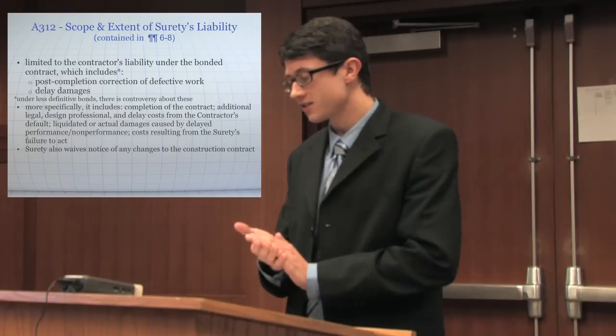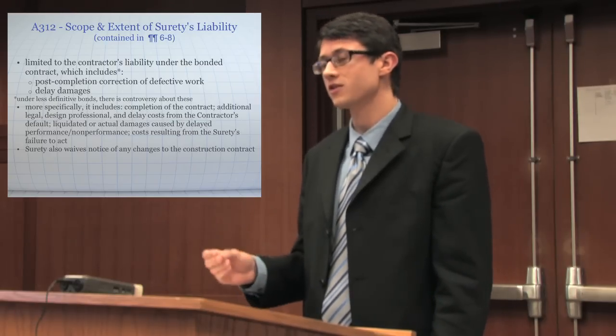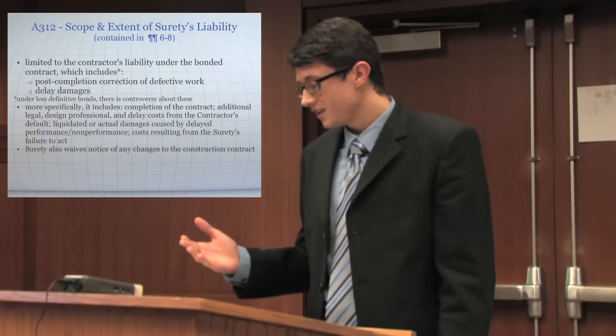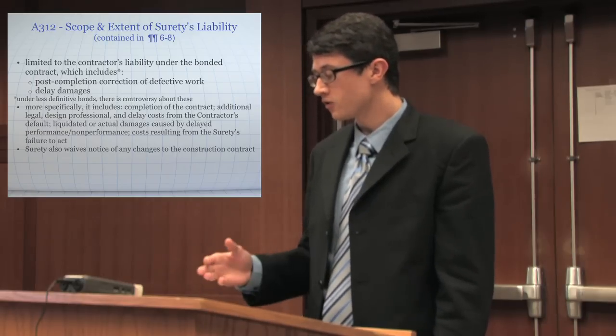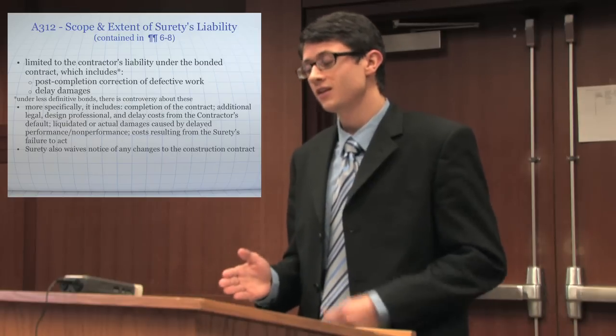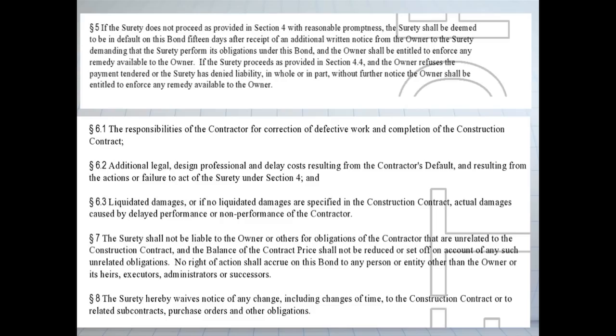Under the A312, the surety is liable for correcting defective work after project completion and any damages caused by delay in completing the project. More specifically, this includes the total cost of completing the contract, as well as costs, legal fees, or cost to design professionals resulting from the contractor's delay. The A312 also makes clear the surety will be liable for liquidated damages — but only if the construction contract includes a provision for them. If there's no such provision, the surety will instead be liable for actual damages caused by the contractor's delay or non-performance. If the surety fails to act within a reasonable time when its performance becomes due, it itself may be held to default, and the owner can assert any available remedies against it.